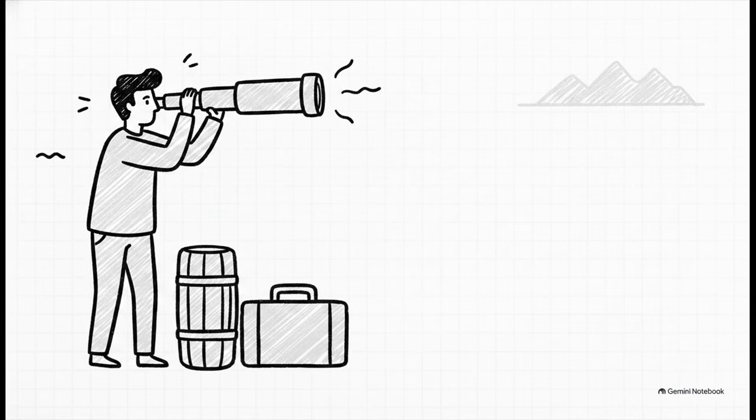Because remember, risk management is proactive, not reactive. Risk control means we are continuously monitoring those risk triggers during every single regular status meeting. You're asking, are our assumptions still valid? Have any new risks popped up? By constantly watching the horizon, we ensure that the moment a trigger is tripped, we can deploy our contingency plan smoothly, efficiently, and totally without panic.